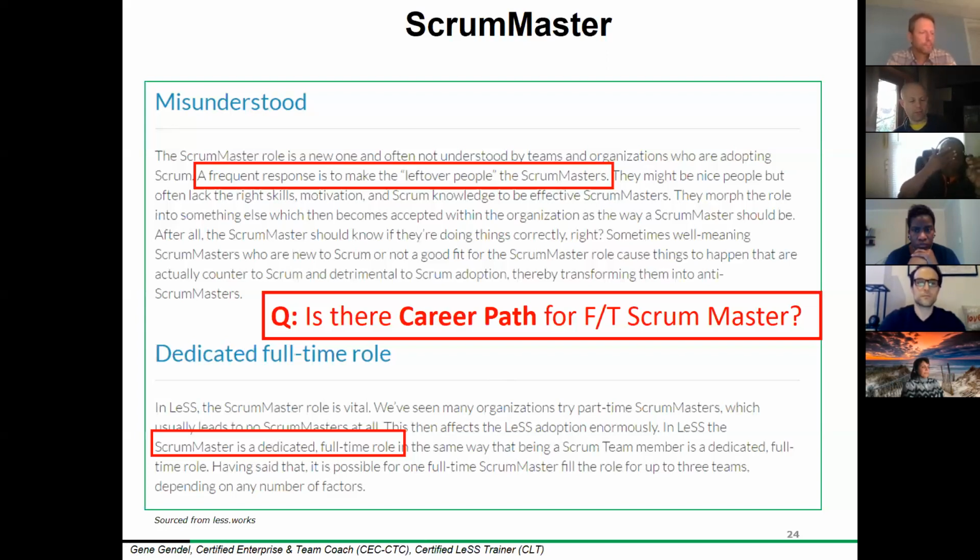So the relationship between these 3 guys or gals is simple. Each one of them is focused on their respective teams and on the organizational design that is part of the LeSS product group. They have some points of interaction. The most classic place where you meet is the joint retrospective. Each team has their own retrospective, but there is also a joint retrospective. And there are other informal ways they can communicate and interact, through Scrum Master communities. We strongly recommend having communities in LeSS, as well as any other informal communication that is needed.